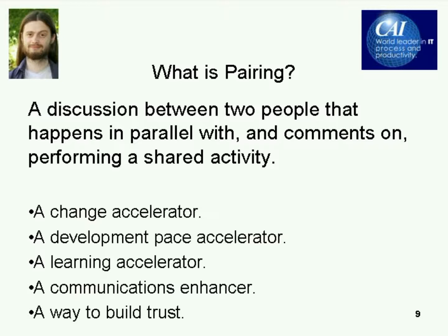So what you find when you do pairing is that the pair as a whole gets its job done faster. It doesn't get its job done twice as fast, but it can be pretty close to that. And in fact, a team that pairs extremely well will get above twice as fast. But at first, you can probably expect that putting two people on every task will take about 1.25 times as many man-hours to complete. But that means that it will complete in something like 60% of the calendar time that it used to take.